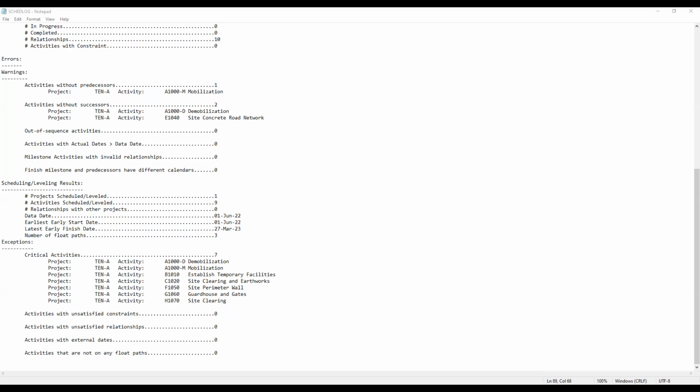Now, since we have already completed what we call the tender schedule as a time-detailed schedule, this time we will incorporate a resource and cost estimate and other elements into our tender schedule using Primavera P6, and we will call this our tender program. Okay, now let's move forward.